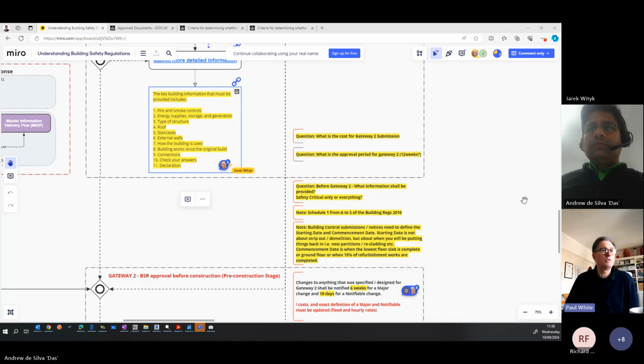Potentially you can't select the doors, potentially you can't select the fire dampers if you don't know what they are. And I'm fairly certain that during the next stage, there will at least be a minor thing that you would have to put back up. And if we're not careful, we'll end up with 6-week delays, etc. Or delays right at the end when somebody's done something that they shouldn't have done.